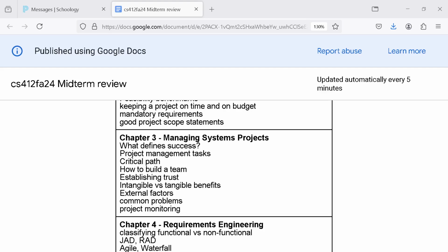It's reasonable cost, delivered at a reasonable, agreed upon time, you meet the deadline, and the quality validated in some way in some testing. And this is where we did our Gantt chart, laying out tasks and estimating the amount of time. We didn't do a lot of cost, although remember in those project management tools, you assign a cost to your people that you expect to work on it, and then you estimate the amount of time to complete, and there you have their pay rate times the amount of time. But there's a ton more things that go into cost management.